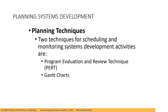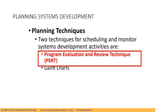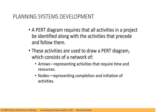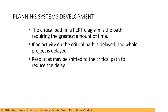There are two techniques for scheduling and monitoring system development activities. They are PERT, the Program Evaluation and Review Technique, and Gantt charts. PERT is a diagram that requires all activities in a project to be identified along with the activities that precede and follow them. These activities are used to draw a PERT diagram which consists of a network of arrows and nodes — arrows represent activities that require time and resources, while nodes represent completion and initiation of activities. The critical path in the PERT diagram is the path requiring the greatest amount of time. If an activity on the critical path is delayed, the whole project is delayed, so you need to determine what are the critical paths in your system development lifecycle. Some resources may be shifted to the critical path to reduce the delay.